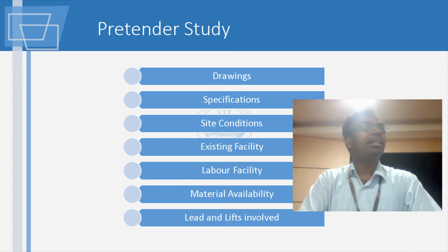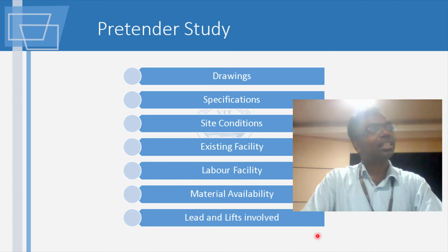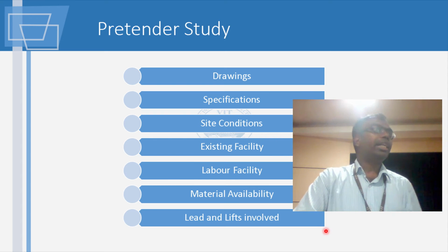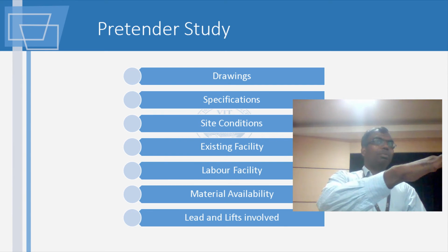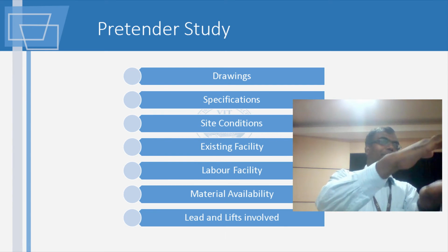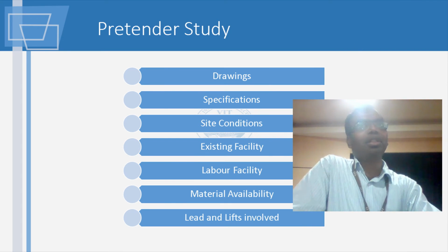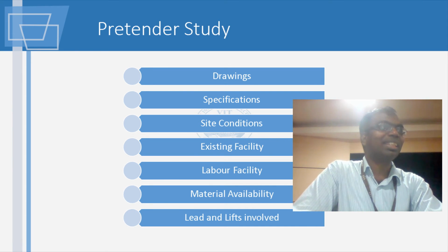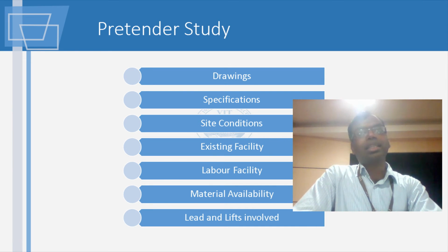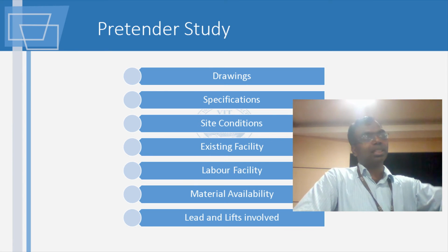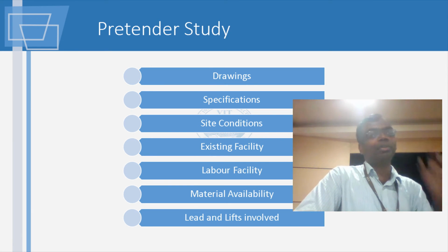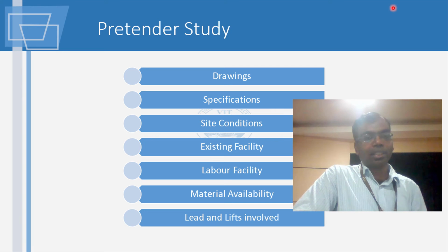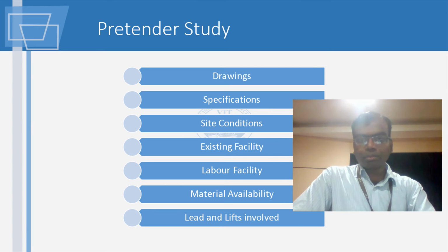So your specifications are defined. Before you get a contract, specifications are defined. NTPC job, 4 volumes will be this big. 4 volumes. So maybe 50% or maybe even 70% of that will be commercial terms. 30% is engineering, which is also significantly a big number, big size, right? So if you are on the contract side, you will have to go through that 70%. If you are on the engineering side, you should be very thorough with the 30%. Okay.